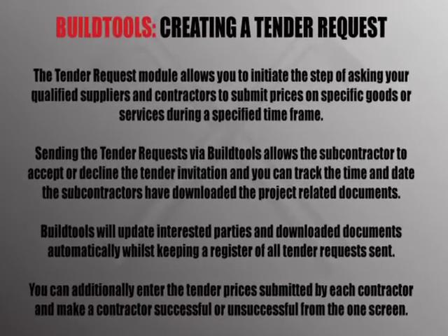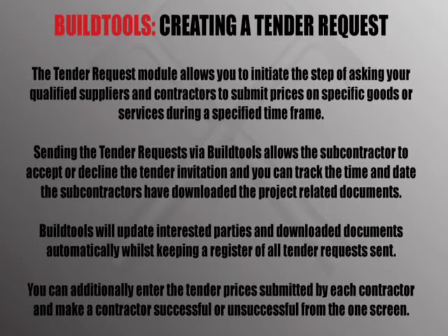The tender request module allows you to initiate the step of asking your qualified suppliers and contractors to submit prices on specific goods or services during a specified time frame. Sending the tender request via Buildtools allows the subcontractor to accept or decline the tender invitation, and you can track the time and date the subcontractors have downloaded the project-related documents.